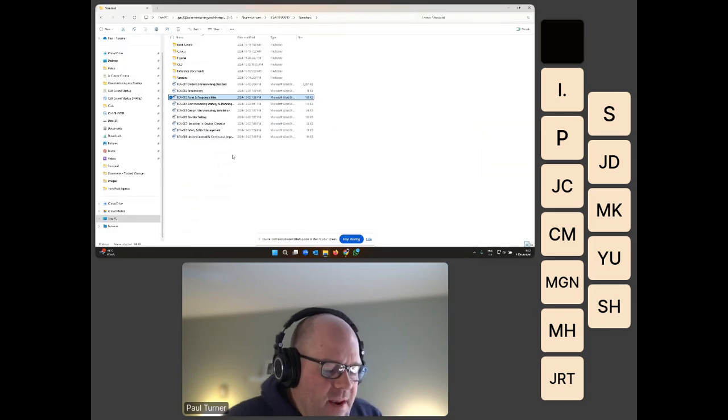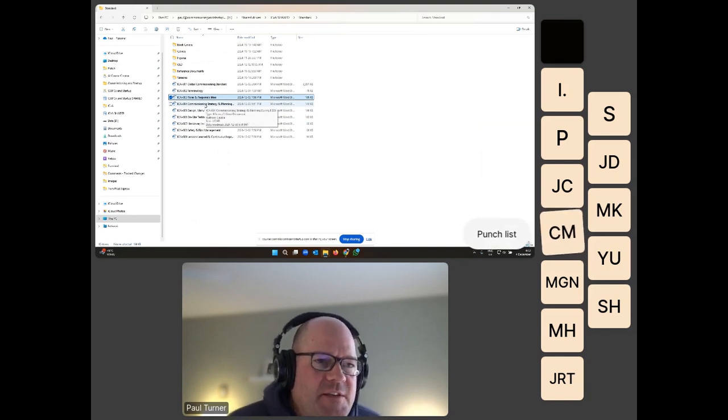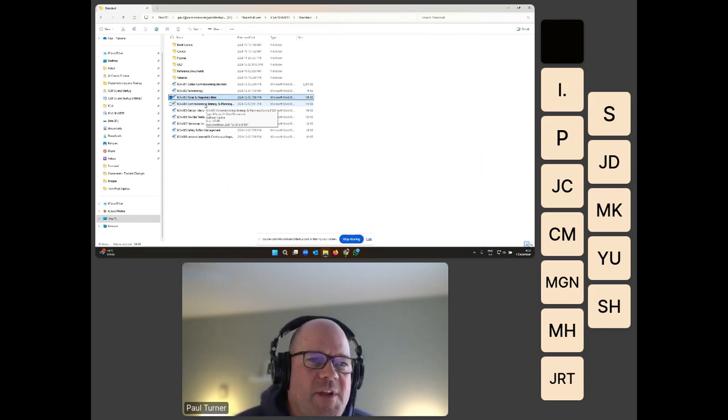So then the next document is where we get into really the nuts and bolts of the commissioning process. So ICA 004 is our commissioning strategy and planning document. This defines the process for early commissioning involvement, for definition of really 2 documents that define your commissioning strategy.